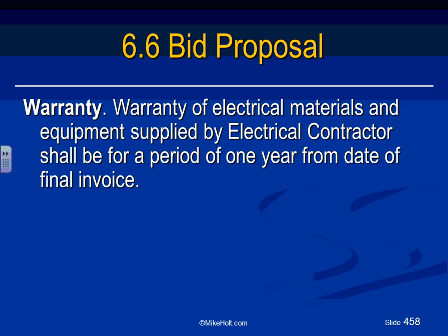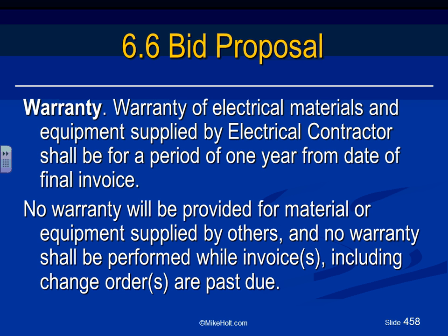Hand the key to the owner. You got your money, right? Now you start, you put your date. No warranty will be provided, shall be others. So this is just including a UPS system, guys. If there's a malfunction and it burns, I don't warranty the UPS. The UPS manufacturer will warranty the equipment. You warranty the construction and installation.